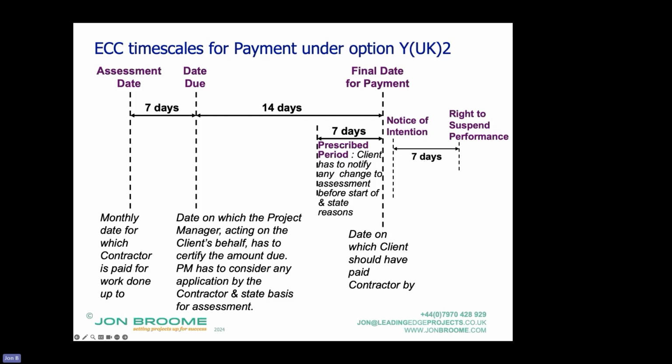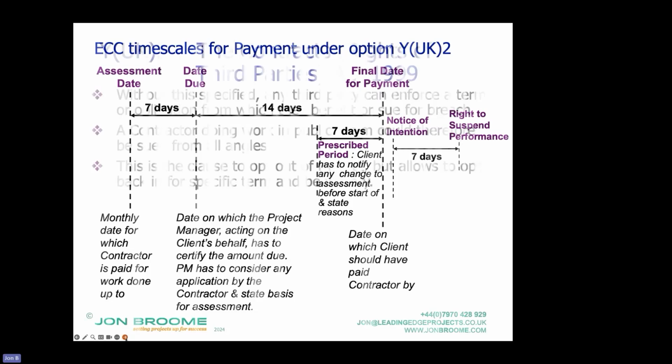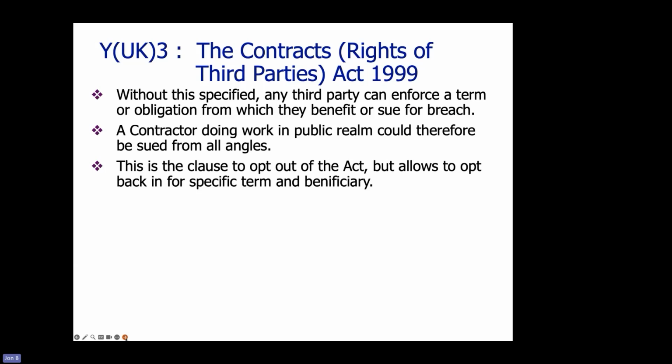It's rarely used because it's a winner takes all, as in if the contractor uses it correctly, they get a compensation event for demobilizing, doing nothing, remobilizing, time and cost. If they get it wrong, it's all on them. So I've only heard of it being used 3 times.